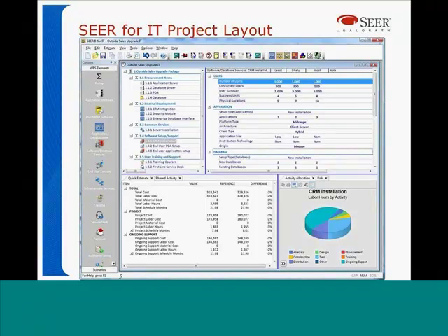And each one of those elements can be grouped together under summary elements or roll-up elements. So you can organize your estimate in any way you want. Basically, you use the estimation or WBS elements and collect them in different groupings and ways to make up the items in your estimate. Now, for the selected item on the right are the input parameters for that particular item.